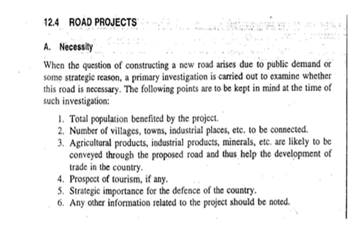First we will see the necessity. When the question of constructing a new road arises due to public demand or some strategic reason, a primary investigation is carried out to examine whether this road is necessary or not. The following points are to be kept in mind: the total population benefited by the project; the number of villages, towns, industrial places, etc. to be connected; agricultural products, industrial products, minerals, etc. likely to be conveyed through the proposed road to help development of trade; the prospect of tourism; and strategic importance for the defense of the country.